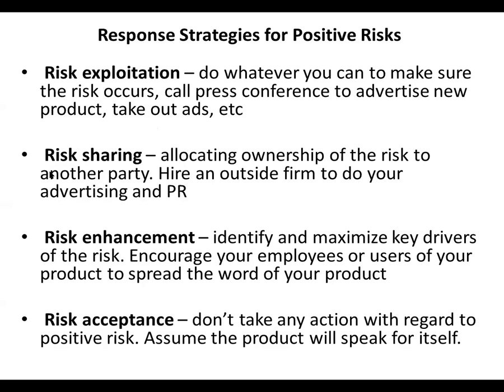Risk sharing means allocating ownership of the risk to another party. We are hiring an outside firm to do your advertising. We try to give it to an advertising company because they do it better than us, because they are specialized in advertising. We allocate ownership of the risk to another party.